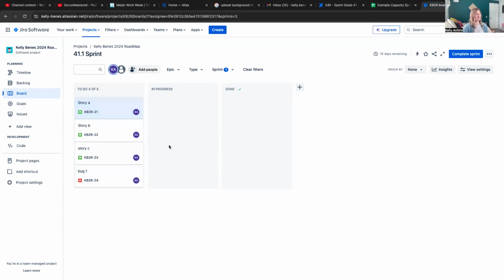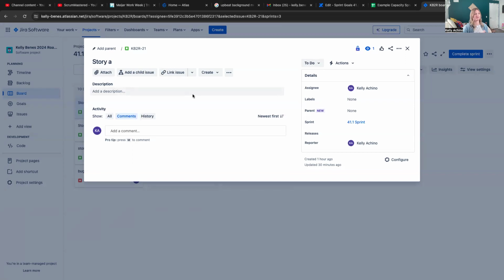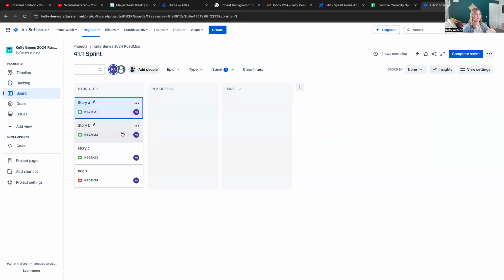We have 4 user stories that we are planning on, and ideally, you can go into these, groom them with your team, and make sure any information your team decides together that is really pertinent is captured. Maybe you've got some labeling systems, maybe you need to link these to your features or your epics, maybe you need to make sure your acceptance criteria is accurate, maybe test cases are defined, whatever you need to do here. This has almost no information in it, but we're also going to hope that each of these user stories has an estimate in it before you start your sprint. Load it up, and make sure the points total and don't get us above 21.